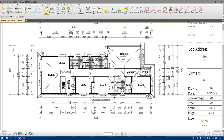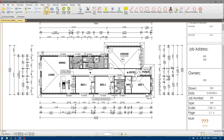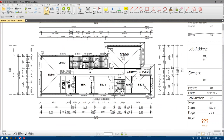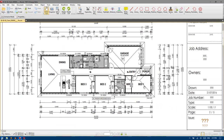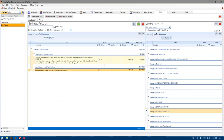Hips and valleys — back to the floor plan. One, two, three, four, five, six, seven, eight, nine. So we don't count the ridges. So nine minus five is four.